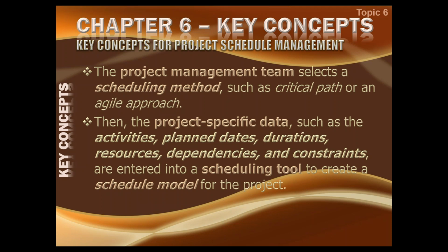Once that has been baselined, then there are no more questions. We will then start working on that. And in case of any change request later, we can always change that project specific data again. But whenever we decide to do that, it has to be done through a proper change request. Remember, schedule is the most sensitive data. A little change in data will shuffle the whole schedule very badly, and we can't take a lot of chances.